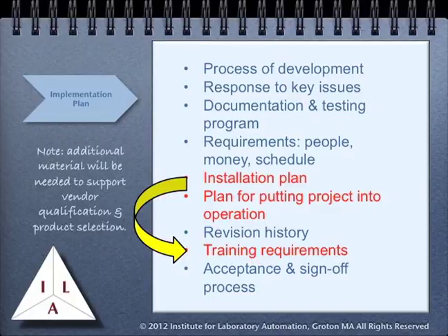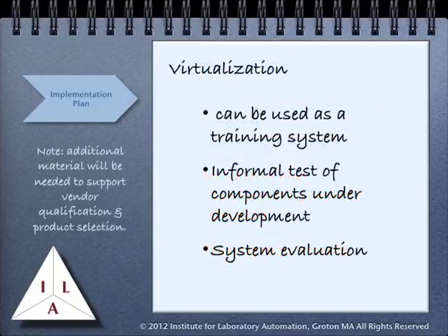One approach to dealing with training issues is something that we mentioned earlier, virtualization. By creating a virtualized system of a project, even when it's under development, users can begin to gain some familiarity with the system before it's fully implemented. That means that training and implementation can overlap, which benefits the schedule. And also, any problems that the users see can be addressed earlier. This becomes an informal method of testing the system, but not a substitute for a carefully managed test and evaluation program.